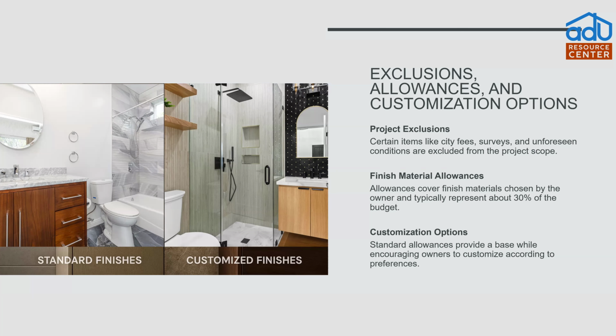And then unforeseen conditions. These things do come up. They're rare. We had a project not too long ago where we started digging the foundation for the ADU only to discover that the previous homeowner had filled in their pool and didn't do it correctly with permits and just put some dirt on top of it. And when we started digging to put the foundation for our ADU, we discovered, hey, there's a pool here that's buried under the dirt.